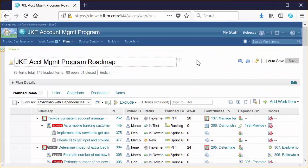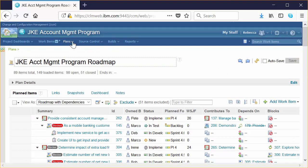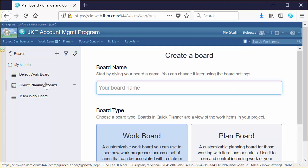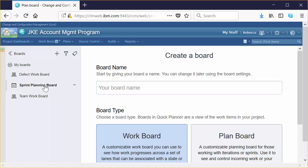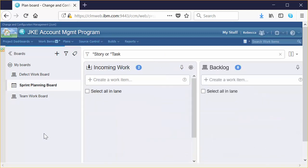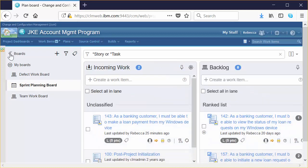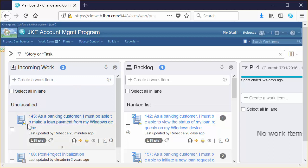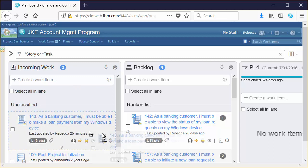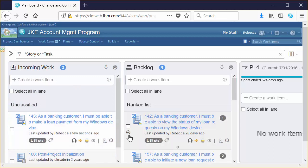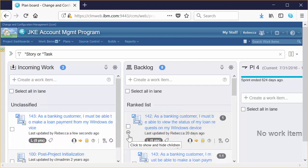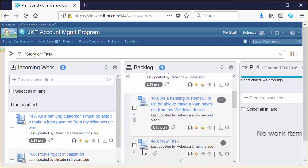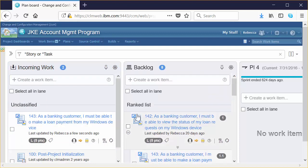Now, if you're a team doing sprint planning, Quick Planner is the thing for you. Just like plan views in traditional planning, Quick Planner is another way of looking at the data. There are different kinds of boards. A sprint planning board, for example, is very typical for a team that's leading a daily scrum meeting where they're viewing incoming work, managing and grooming their backlog, and planning for the next iteration or the next sprint. The Quick Planner boards provide drag and drop. They provide easy child task breakdown, as you can see here. So a very simple way of doing team-based planning.